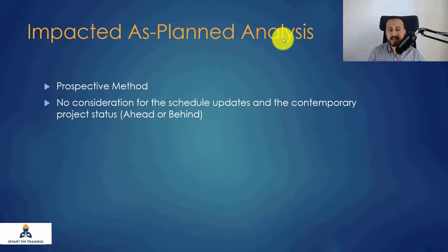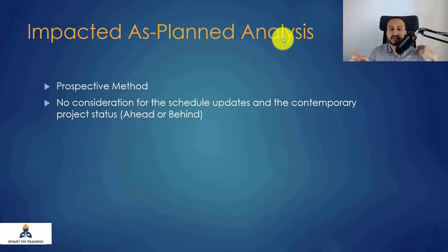For example, I have one schedule update — I am the contractor and I did really good progress. It is showing me that the forecasted completion date is one month earlier than the project completion date.